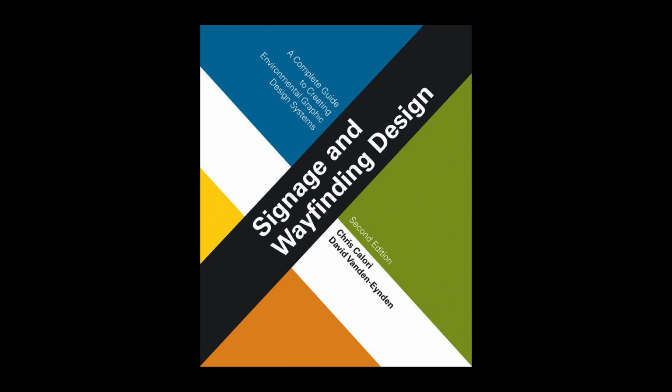Although such protocols can be cumbersome, they are vital, as they help prevent mistakes and misunderstandings by ensuring that all project communication is transparent and that all key players are aware of the status of the submittals. It is definitely bad form for the designer to discuss submittals directly with the fabricator without inclusion of the client's contract rep and/or architect. Although in certain cases, the contract rep and/or architect will authorize such direct contact.